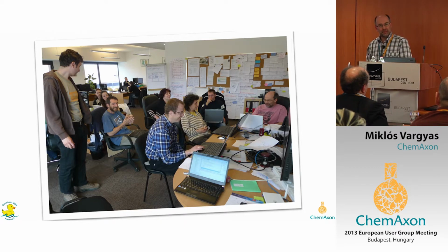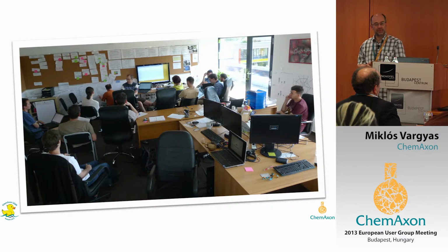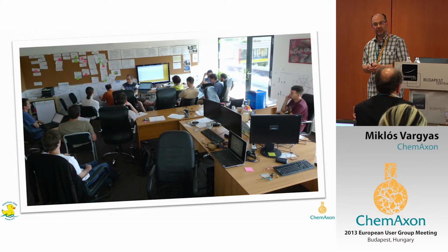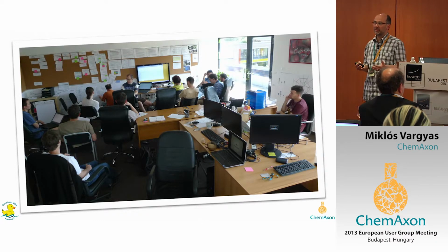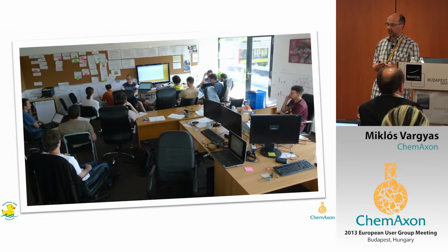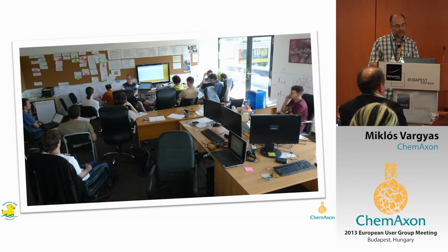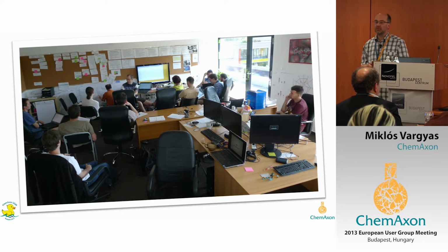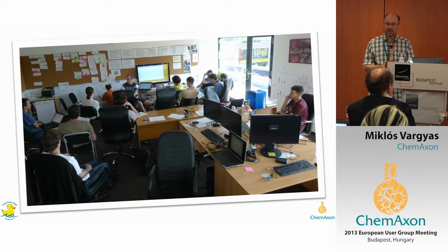In this meeting, the Sprint Review meeting, the team demonstrates the work that was done during the course of the sprint. And based on what was done, what's been achieved, they decide what to do next. What will be the next product increment that they will build in the next sprint? But before doing so, they hold a meeting called the Retrospective meeting. And some people might call this a postmortem, but I just call it a retrospective meeting.